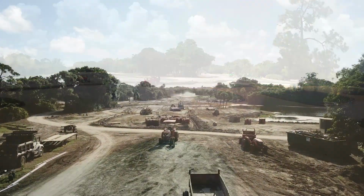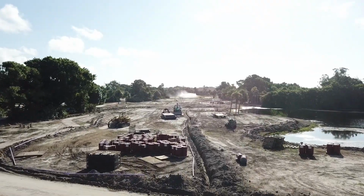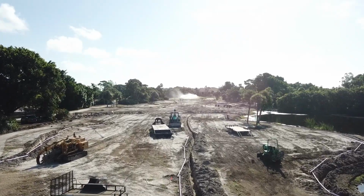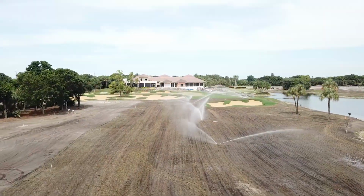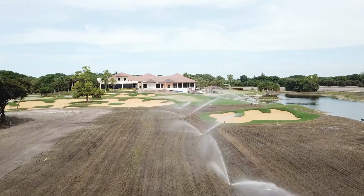Installation of the new irrigation system was completed this week, and the system is now fully operational. Over the next 2 to 3 weeks, our irrigation contractor, Nut Construction, will set valve boxes, level sprinkler heads, develop as-built maps, and take care of punch list items we present to them.